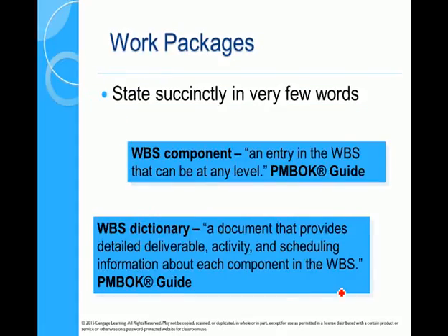So a work breakdown structure component is any component in the work breakdown structure. It can be at any level. The idea of a work package is that it's at the lowest level. The WBS dictionary is kind of a misnomer. What you really do is you create these cards called work packages, and on these cards are the detail. That is, when will the work be done?